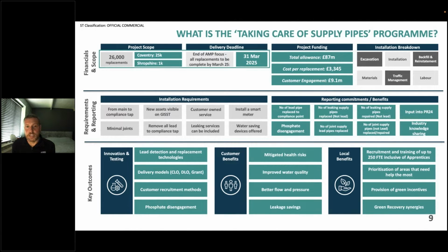Split services: in the UK, we have a lot of shared supply pipes. We'll have terraced houses, which will have a single pipe going down the side of the house, and that'll tee off onto 4, 6. And weirdly, we've even come across a supply pipe which feeds 31 properties. All this stuff then we needed to report on, then had to be put into the PR24, which will be the next AMP8, and then to see how we follow on forward into the future with it.